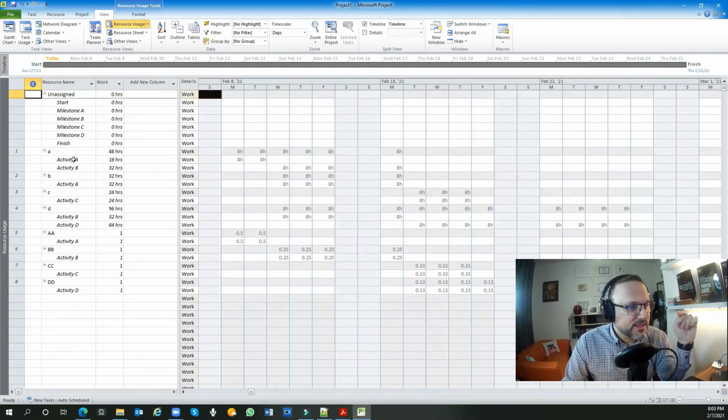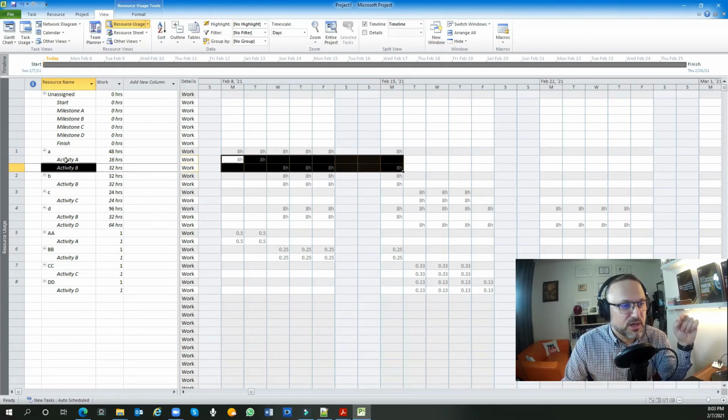You can see that activity A and milestones take how many hours, and each person, A small is a person, A, he is involved in activity A and B, and his working hours are mentioned in this way. So you can hire this person, and you plan the person's hours according to those hours which are defined here.